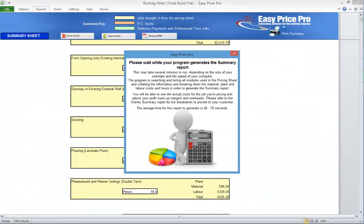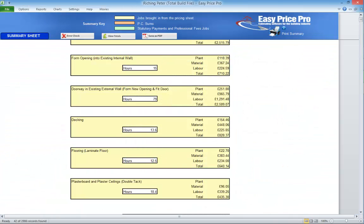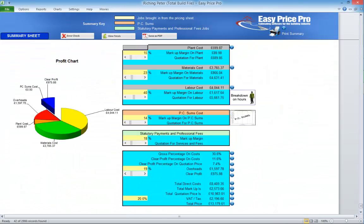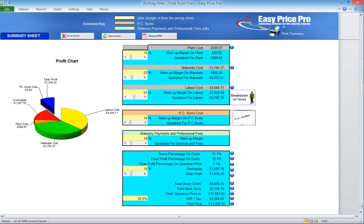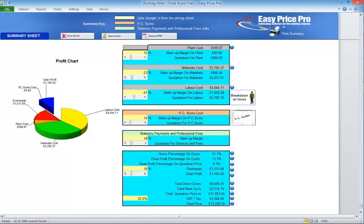You can scroll right down or click this button to view the totals. Check the markups and overheads percentage. Use the sliders to adjust it if required. Here's the total. You can export the summary as a PDF if required.